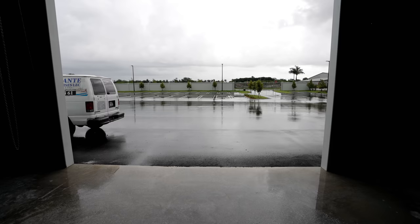Part of that is it's much harder to build the catamarans right now. Hard to get a set of four engines. Hard to get a steering set for four engines. Hard to get two 400 gallon, quarter inch aluminum fuel tanks. So in the slowdown of parts and accessibility to raw materials, the catamarans have suffered a little bit because they take the most parts.